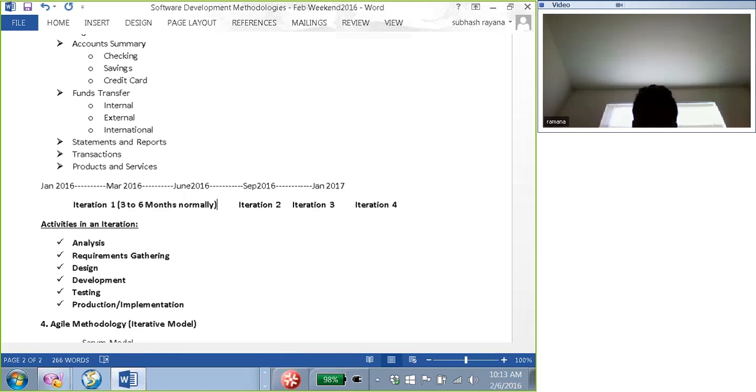Normally what happens is during the project plan, it is the responsibility of the project manager to analyze the effort required and plan things accordingly. But what we see happening most of the time is the project plan is underestimated, the work is underestimated. And if you're asking me why, it is because the project manager wants to keep the business happy, right?